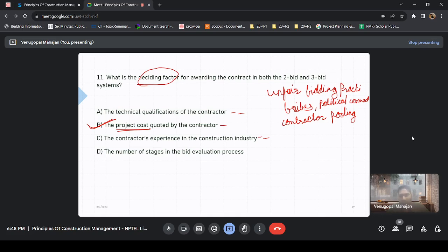See, the quality of the construction, that is quite a different thing. And see, we have seen that if the project cost is 100 crores, somebody is bidding even as low as 75 crores or 70 crores just to get the contract. And yes, if some specialist decided that the cost would be 100 crores including 10% contractor profit, then going below that doesn't make sense.